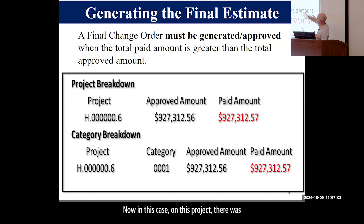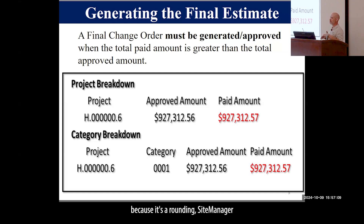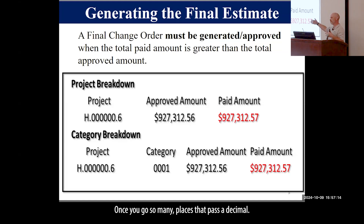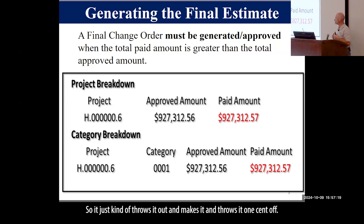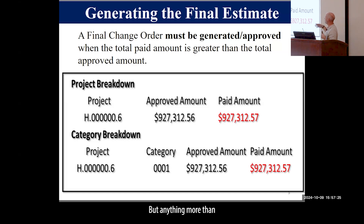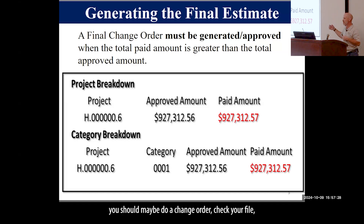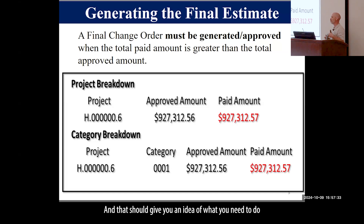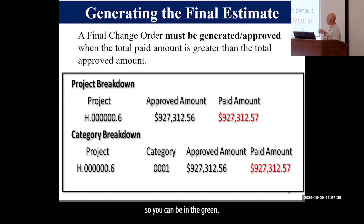In some cases it may be only a one cent difference — we don't worry too much about one cent because it's a rounding issue. Site Manager does some weird rounding once you go many decimal places out, so it can throw it off by one cent. But anything more than a dollar or so, you should do a change order. Check your underrun report — that should give you an idea of what you need to do with the final change order to bring those quantities up so you can be in the green.